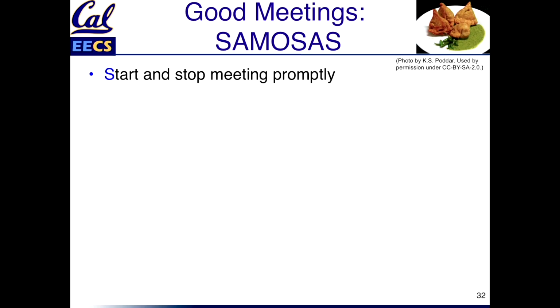So here when we have meetings at Berkeley, there's this idea of Berkeley time, 10 minutes after the hour. At Harvard, where I was just visiting, there's Harvard time, which is 7 minutes after the hour. So when you say 10 o'clock, you mean 10:07. So pick a number like 10:09, right? There's no argument what time 10:09 is. 10:09 is 10:09. It's not rounded up from there. And that's what happens in the Scrum model, right? The Scrum model is you pick an exact time, everybody shows up the same day at that time, and you have a short stand-up meeting.